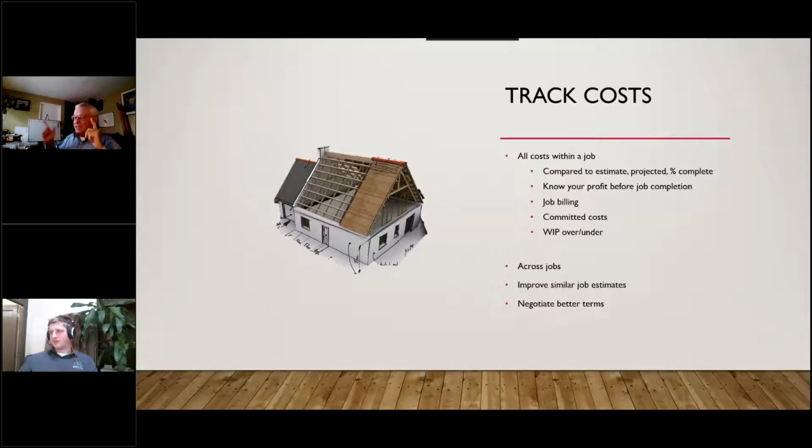It also helps you identify your job billing and manage the WIP and over/under billing, as Michael discussed yesterday during a webinar. Part of that is comparing the job cost to date versus committed costs that are not yet billed or not yet incurred, but you've committed to them.